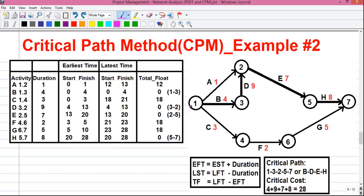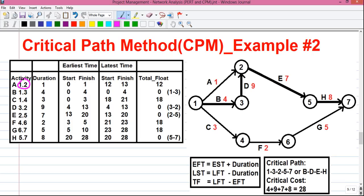So now let's start drawing the table. First, make the table structure and make the columns. In the first column, write activity and then write down all the activities from the network diagram in increasing order. I have written all the activities starting from A ending at H in increasing order. Next, write down the unique start and end event pair next to each activity. For example, for activity A, the start event is 1 and end event is 2. Next, write down the duration for each activity from the network diagram.